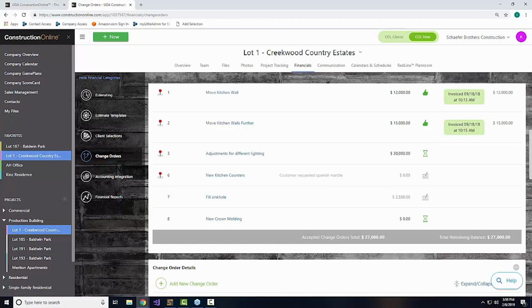It's also a great way, again, for teams to collaborate. I know that in many cases you may have teams in the field or a team member who happens to be on site with a client who requests something, but maybe that's not the team member that needs to cost out that change order, or maybe just additional information is going to be needed. That means that someone in the field can use a mobile app, create a change order quickly, label that as a draft status change order so it gets documented and not forgotten. But then we're not live for the client yet, so you still have the time and space that you need to be able to really accurately cost that out, enter in the information, get it ready for client eyes.